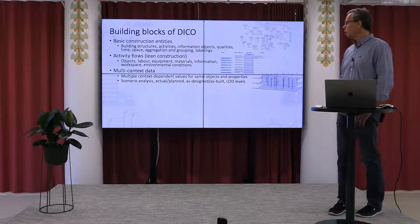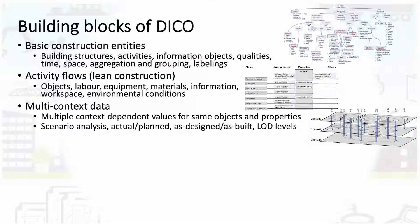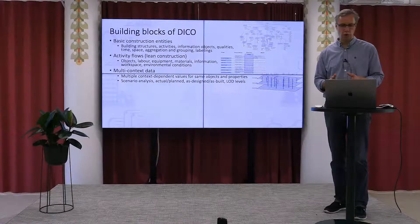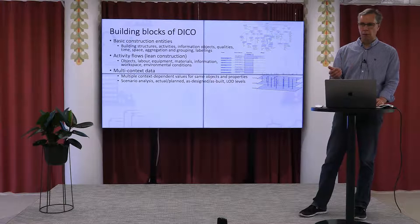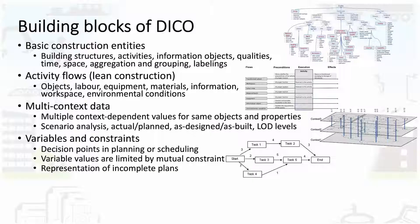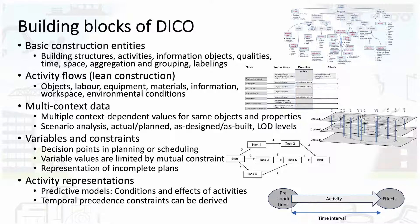One important area is to support what we call multi-context data — a phenomenon that is pervasive in construction management. There are many different alternatives or states of data that need to be represented: for instance, in renovation projects you do renovation scenario analysis; in project planning you have planned and actual values of activity start and end times; there are as-designed and as-built BIM models at different LOD levels; and so on. We also support the representation of variables and constraints important in planning and scheduling tasks, and activity representations that ultimately support automated planning and scheduling algorithms.